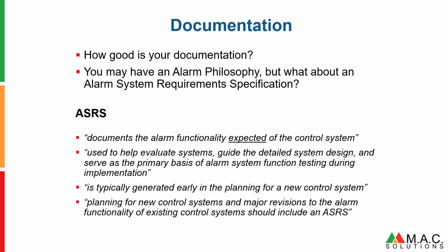Remember, we talked about our management of change process and software acceptance testing. It's typically generated early in the planning for a new control system. So before you buy a new control system, you should have an ASRS, which determines what you require from your new system.